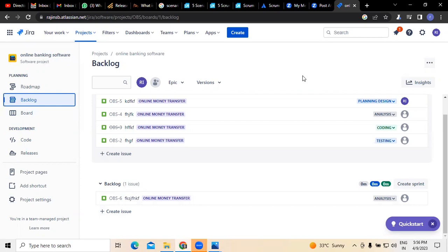For example, user interface login page creation is a user story. Assume that we felt there is a lot of complexity involved in creating a login page as a user story straight away. To reduce the complexity, you can slice the user story into parts. How can you slice that? User interface designing is one part, coding is the second part, testing is the third one, database designing is the fourth part. Yes or no? Right? Archita? Yes. Am I not audible? I said yes. Okay.